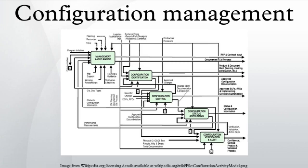Configuration audits are broken into functional and physical configuration audits. They occur either at delivery or at the moment of effecting the change. A functional configuration audit ensures that functional and performance attributes of a configuration item are achieved, while a physical configuration audit ensures that a configuration item is installed in accordance with the requirements of its detailed design documentation.